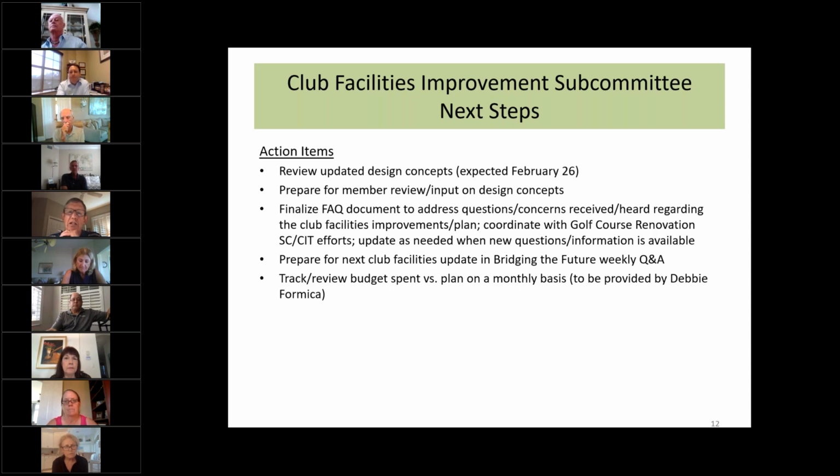Jeff has factors that he uses at this point for that, right? Right. He hasn't said we need 40 chairs and costed them out, but from his experience of doing this over 20 years, he's got placeholder numbers in place for what is appropriate. Tim, correct me if I'm wrong. We asked him at the last meeting what level of finish he is assuming, and he said he's assuming a level of finish in the buildings similar to what we have in the clubhouse right now. All right.